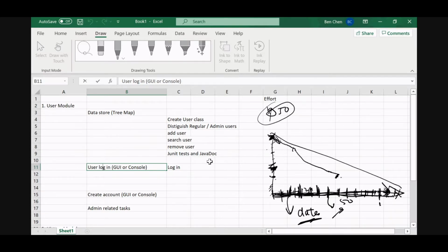You cannot do testing at the end. That's the old waterfall approach: do testing at the end, then when you're running out of time, don't test, and then you produce a faulty product. That's what you want to avoid. So when I saw you put unit test at the end of everything, and Java documentation at the end of everything, that's something you should avoid.